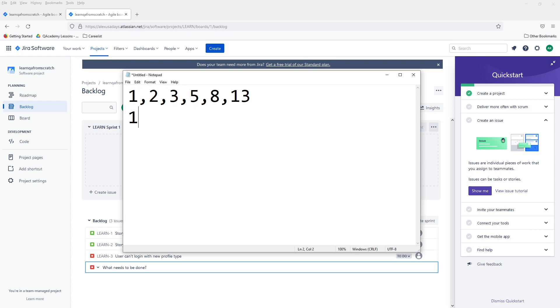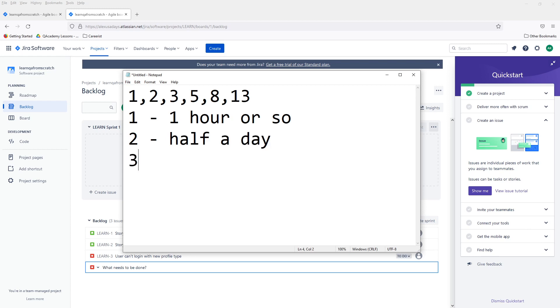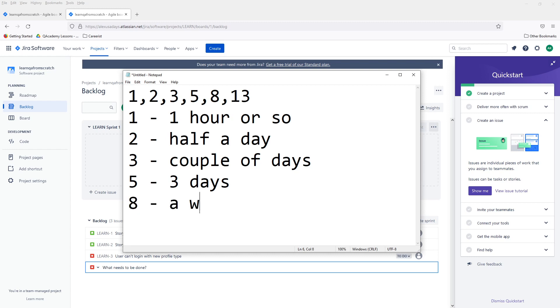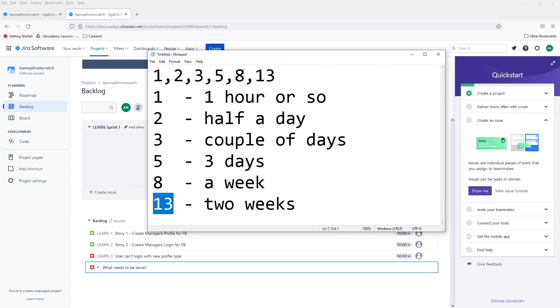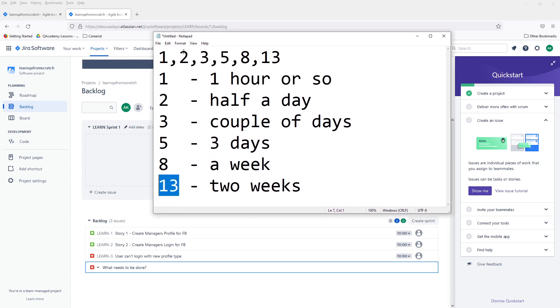If you think about time frame, so one point is one hour or so. There's like no exact measurement because it will differ from place to place, but I'm just giving you some example to base on. Like one is half a day, three is a couple of days, five maybe three days, eight is a week, thirteen is two weeks. So if we know that our sprint is two weeks long, we can't have tickets larger than 13 points or a developer can't have a ticket that is larger than 13 points because it's going to take all his development time.